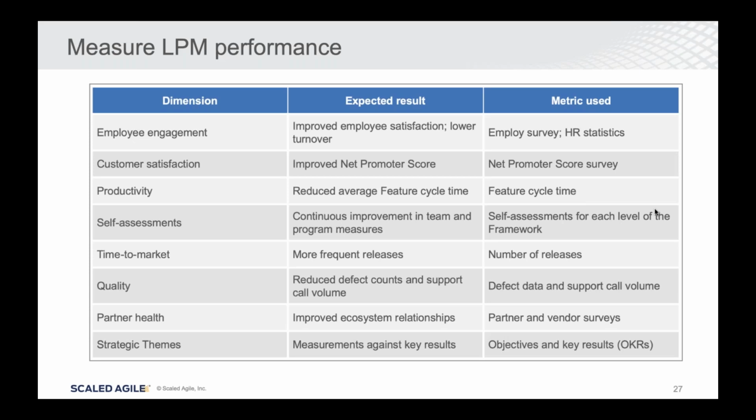Measuring business results is great, but I can't measure business results until I actually deliver stuff. So back in those days, working with him, we focused our early metrics on delivery, and that changed the behavior to get folks to deliver. Later, as we started to get more mature at delivery, then it's, are we delivering the right stuff? Are we getting the business results that we need? And we started to then move the metrics to actually getting operational data, right? And those kinds of things. Or sometimes we'd have quality issues or WIP issues or other kinds of team morale and turnover issues, whatever it happens to be. So he was a master, I think, at changing the metrics to focus on the problems of the day. Can't change them all the time, but they might change a couple of times, twice in a year potentially, as we solve issues and new ones pop up, because there will always be new issues.